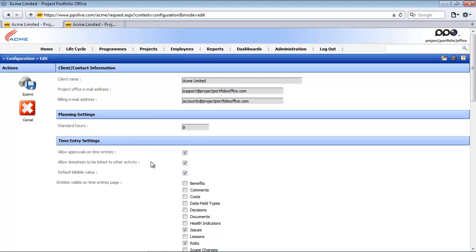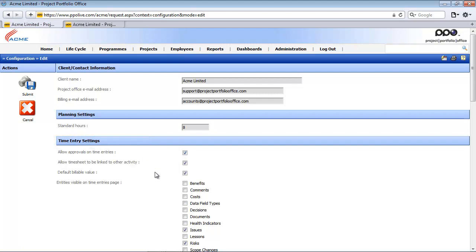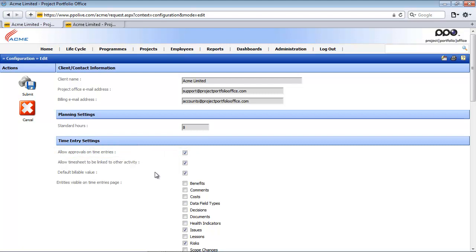The next setting in your system configuration relates to the time entries. The first setting here allows users to send their time entries for approval. When this setting is set to on or true the approval request tick box and the approval status columns will appear on the time entry maintenance page. So let me quickly show you that.